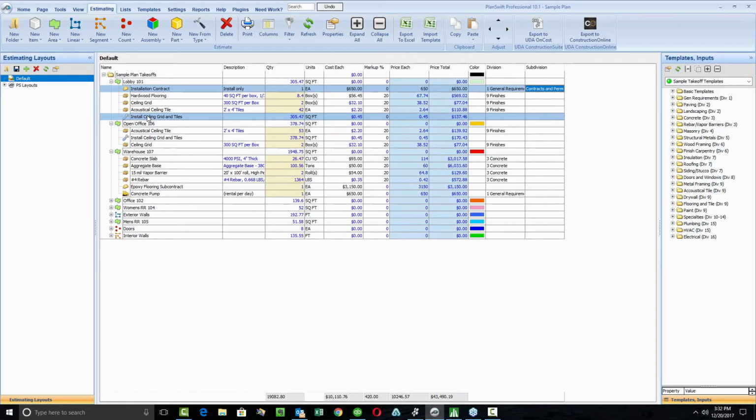We've had a partnership with Remodelers Advantage for years and years, and one thing that I find is a common thread through most of the most successful remodelers that we've worked with in the US and Canada has been the need to organize these costs by room or by area for the estimate itself. This gives your client the ability to say, I see this 2-room set is going to cost us maybe $120,000. The option to do the kitchen as well for $80,000 is something that maybe we need to hold off on for the time being, so let's separate that out from the estimate, and we'll just go with the $120,000 contract for now. This gives you the ability to do so.